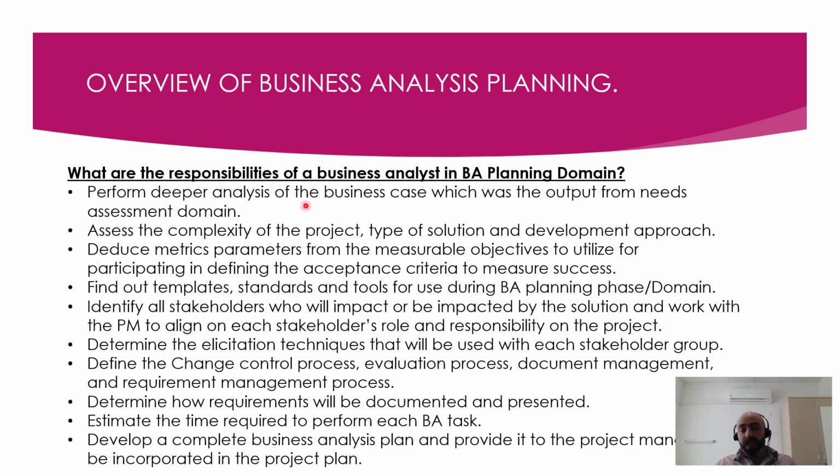Perform deeper analysis of the business case, which was the output from needs assessment. We have said that before. Assess the complexity of the project, type of the solution, and development approach. So how complex? The business analyst will assess the complexity level of the project, the type of the solution, and the development approach, adaptive or predictive approach.